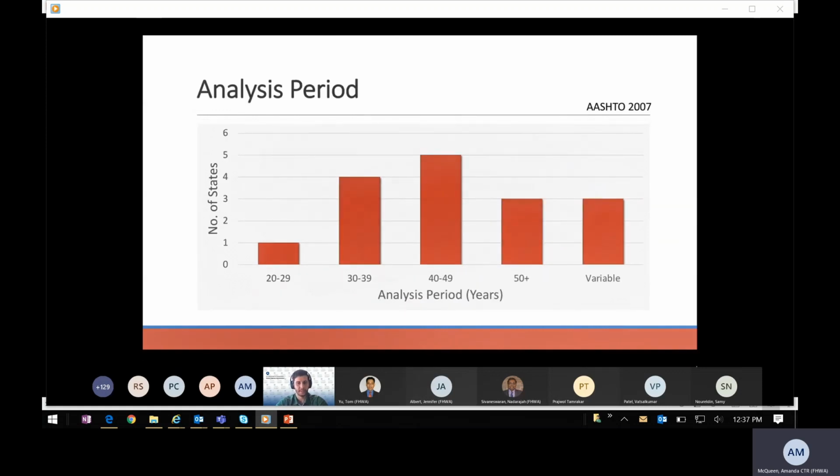As we continue throughout the presentation and discuss LCCA details that are more technical in nature, again, I would remind everyone that if anything is unclear, please check out the FHWA LCCA primer and follow along. Transportation assets are constructed to provide service for long periods of time. The service life of an asset is the period of time that an asset will remain open for public use. More often than not, design alternatives for transportation assets have different service lives. To account for this, an LCCA study uses a common time period to assess cost differences between alternatives so that analysis results can be accurately and fairly compared.